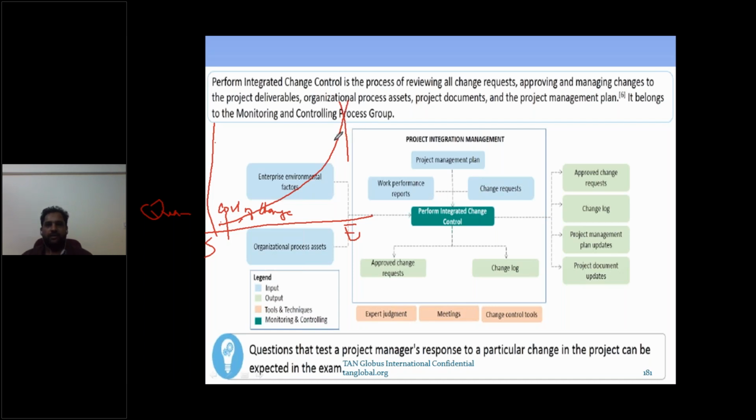It will differ in terms of cost and maybe even resources, because at the very start of the change, I will adjust my cost knowingly, but at the end, it might be a surprise which is not factored for and might cost more, because resources are not accounted for all those changes. Exactly, and the structure is ready now.